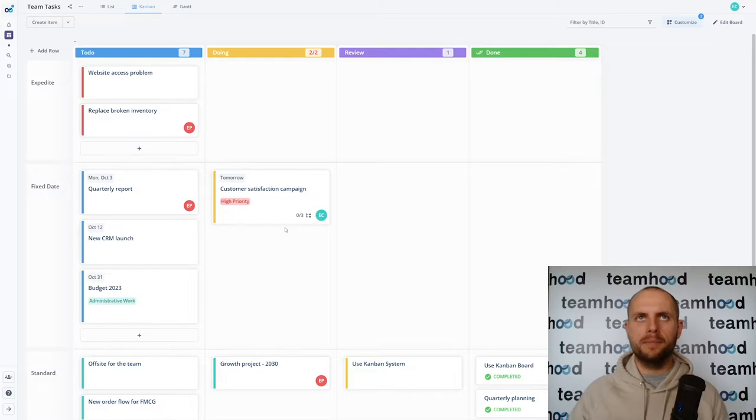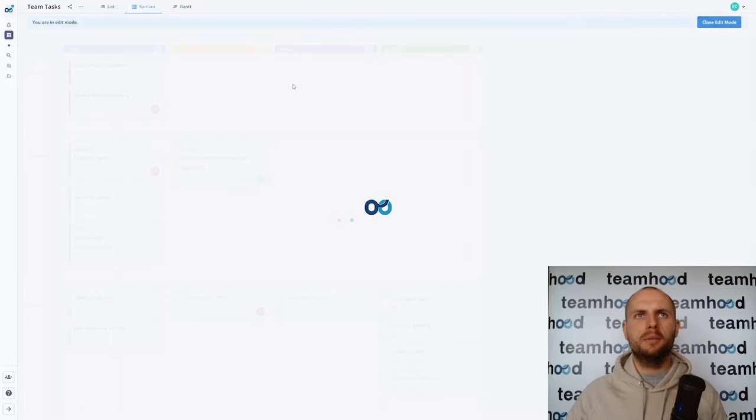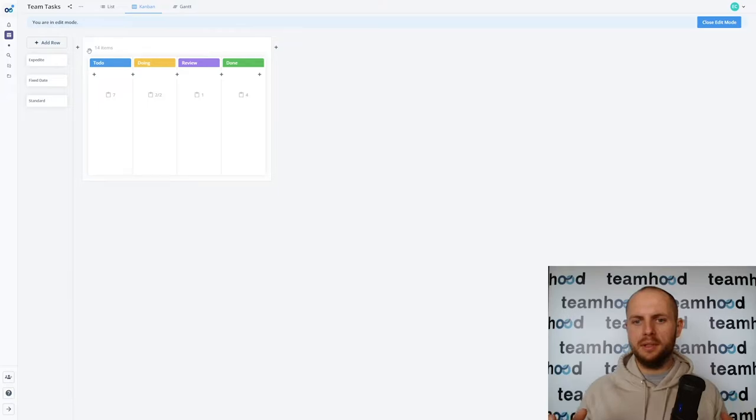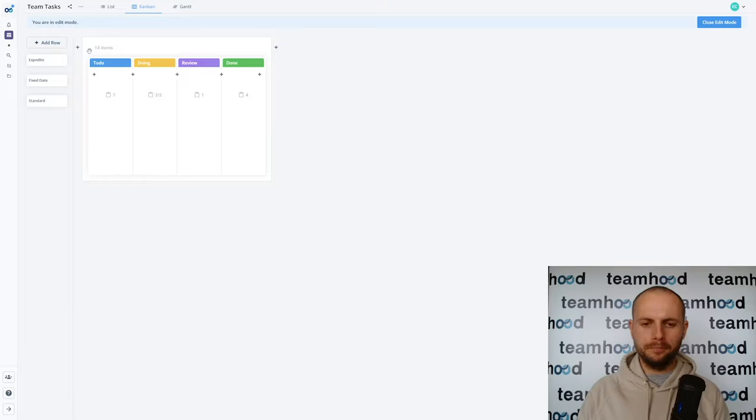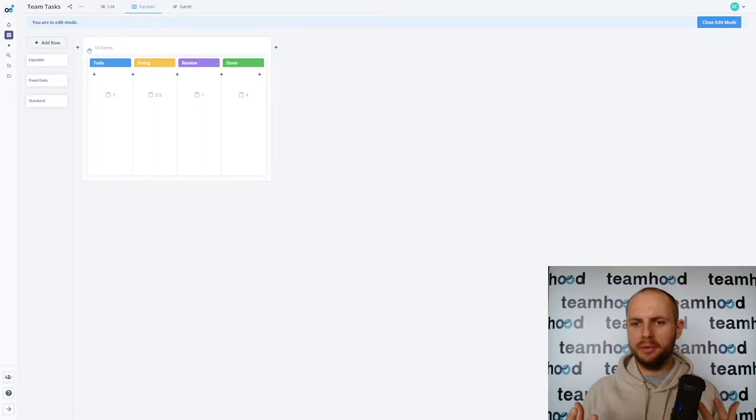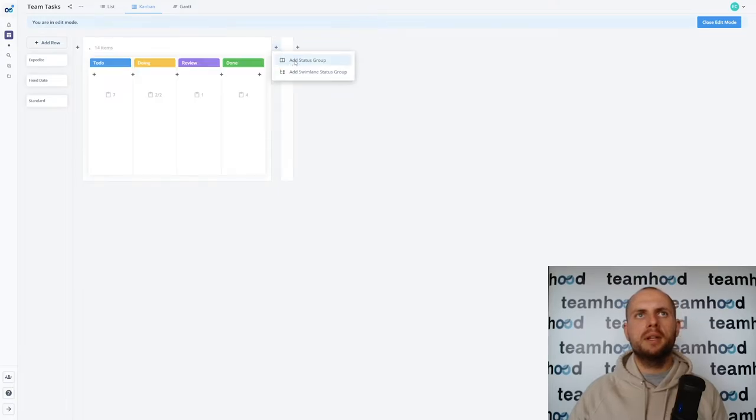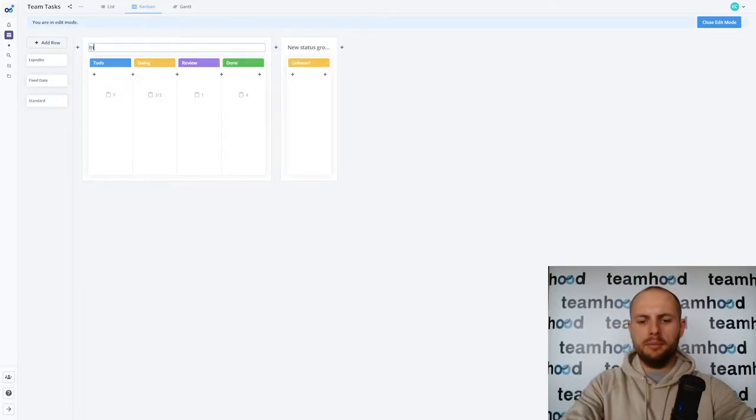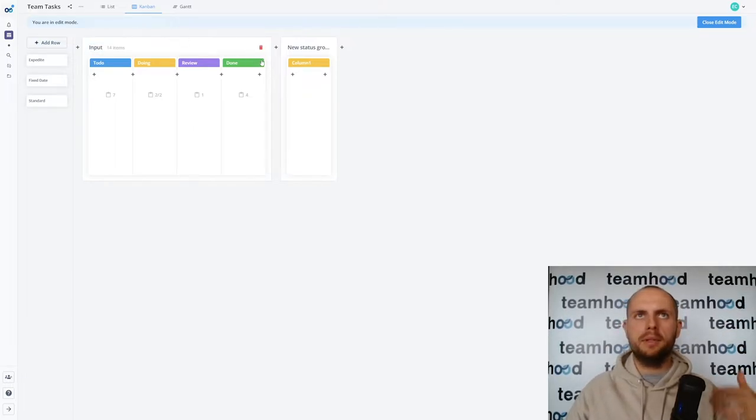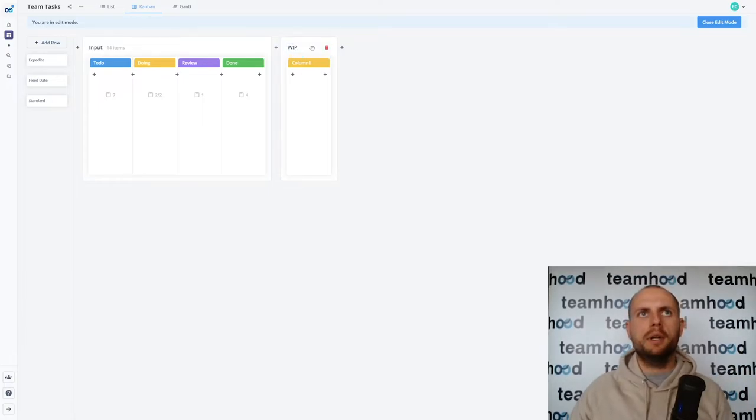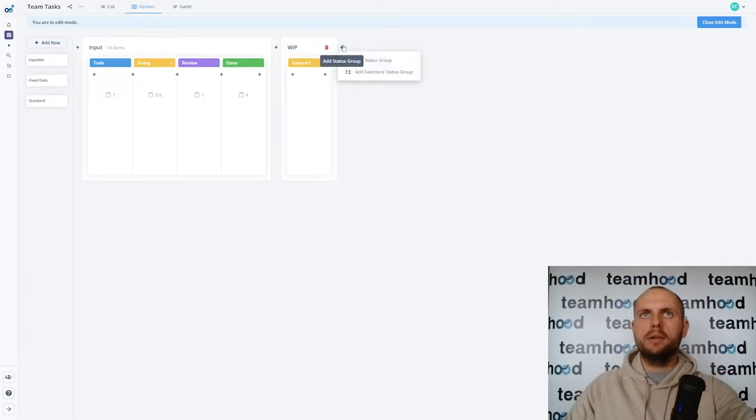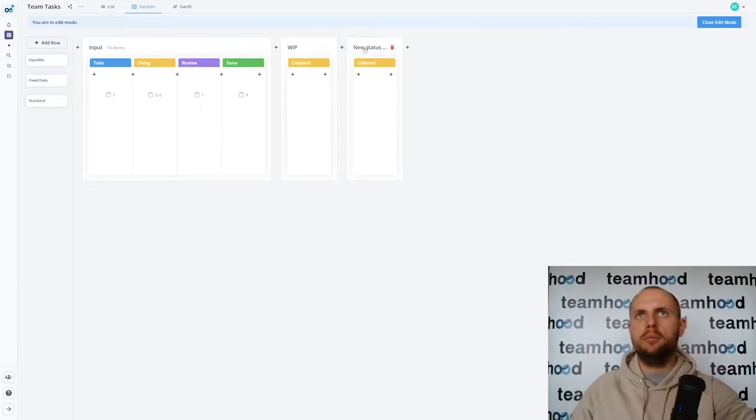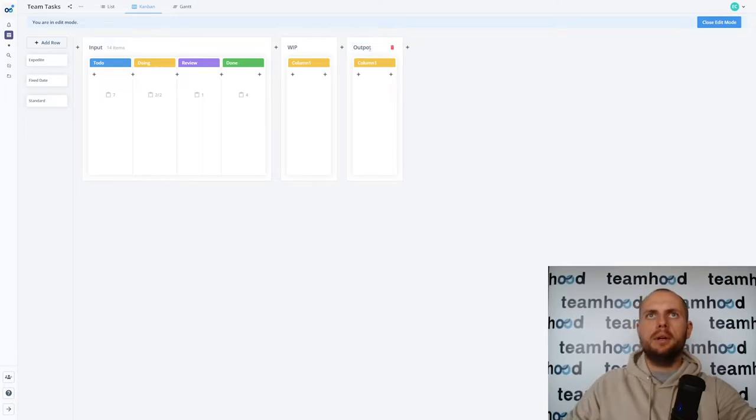I mentioned already a commitment point. Commitment point is another thing which works magic in Kanban systems. What you usually see in standard tools is one horizontal group of columns in one single hierarchy saying that this is your process. But processes have bigger steps and smaller steps and my favorite grouping is to have first group which is called input. It means we create new work in it and we do our planning there, we define priorities. Then second group is work in progress where actual work happens and the third group is usually output, so when we finish work.